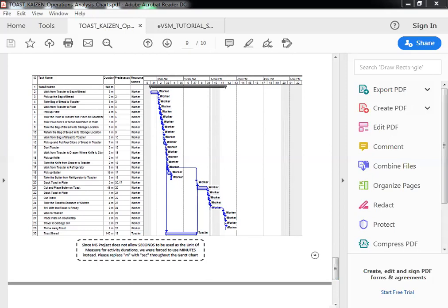So that activity connects the worker to the bread. Bread, worker, bread, correct? So for the duration of step 2, you see the number 2 here, step 2 makes busy the bread and the worker. That's the joining in the Gantt chart.